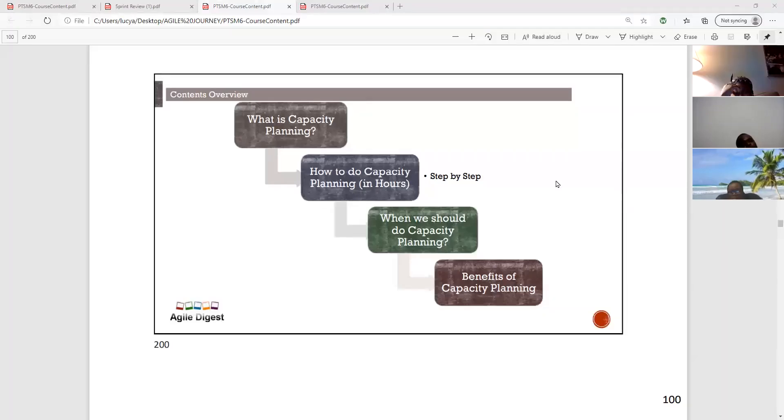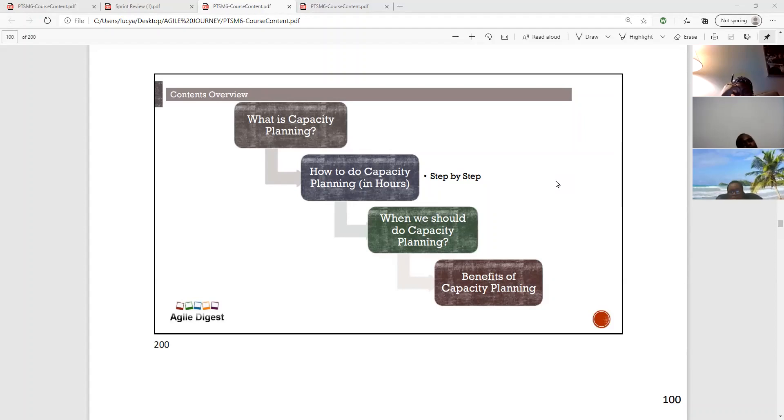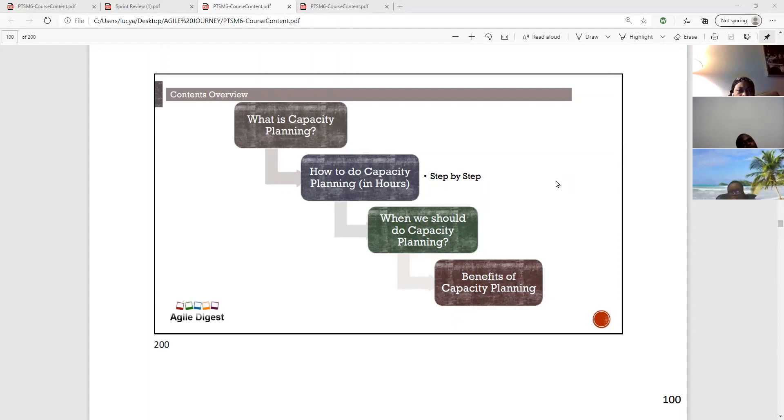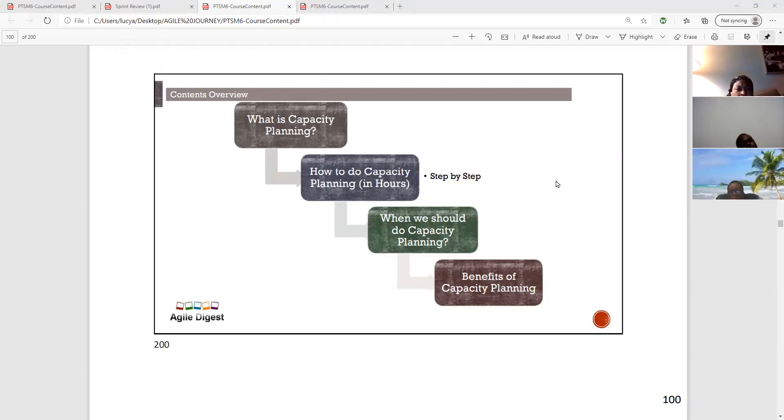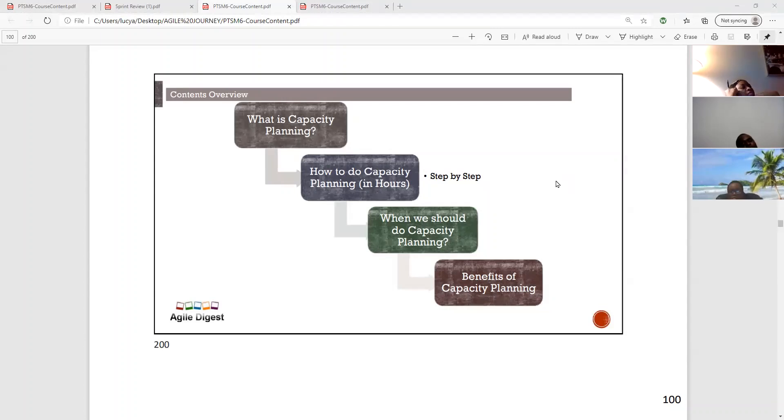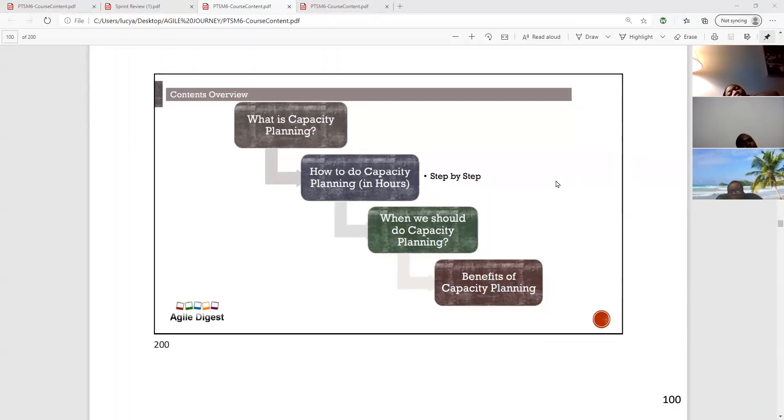What you're going to do next is get ready to start a sprint. To start a sprint, there are certain things that you want to have ready. One of those things is the capacity of the team, your developers, because these are the people that are going to build the product. They are going to build working functionality. So you want to be able to know what they are able to do, what amount of work they are able to accomplish within that sprint period.